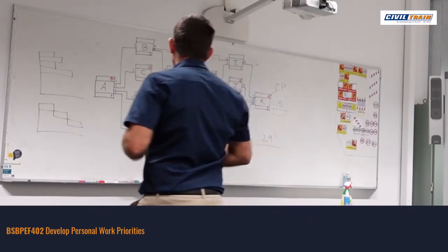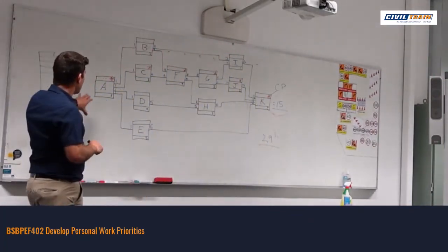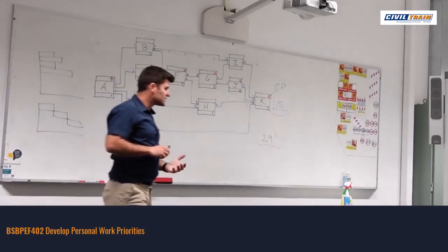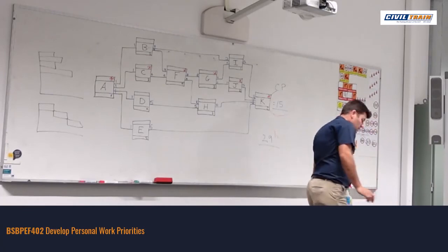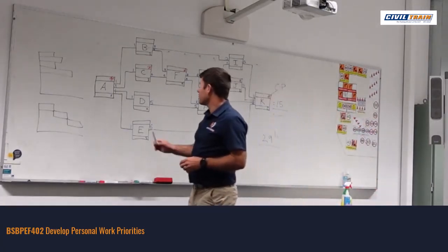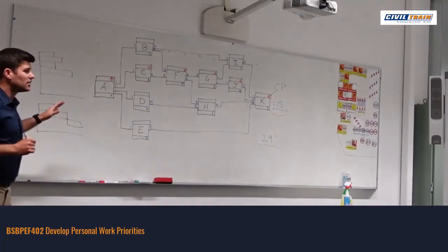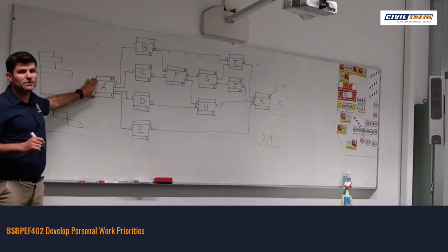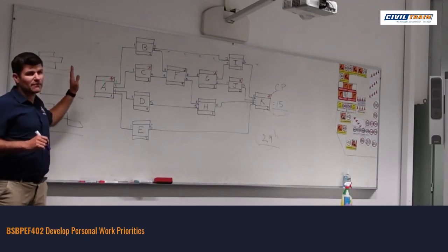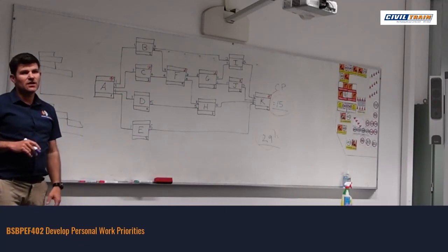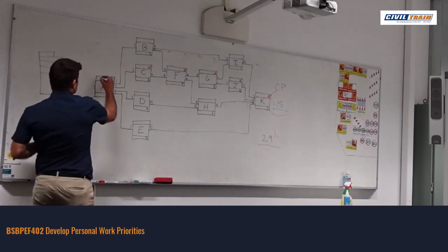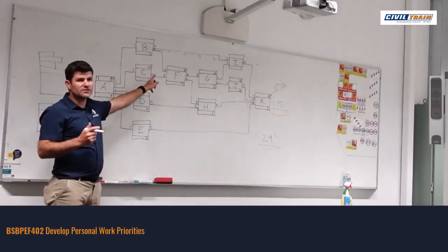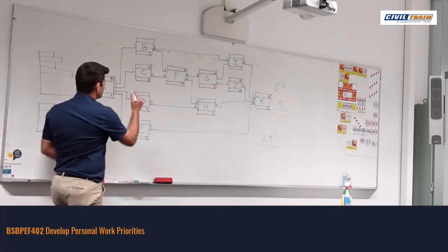So what we have to do now is renumber our task sequence in a cascading number sequence. So how do we do that? This is where, if we go back to the original one, we've got a number following our critical path as closely as we can until we've numbered all our task activities. So obviously we start here at number 1, and I'm going to be following the line, trying to get straight to the next star, my critical path, and I'll make this task 2.